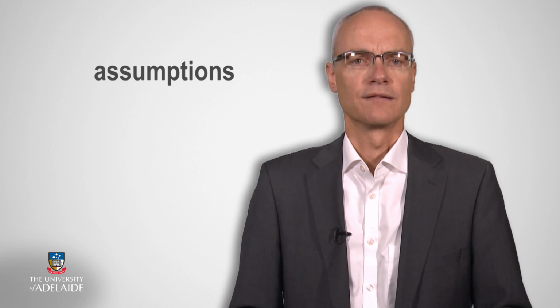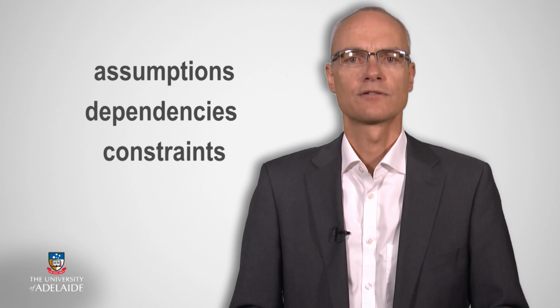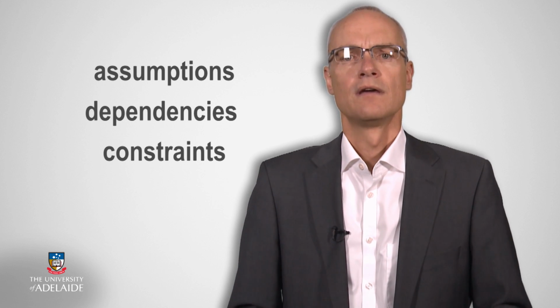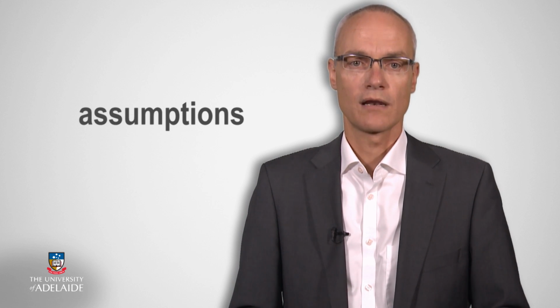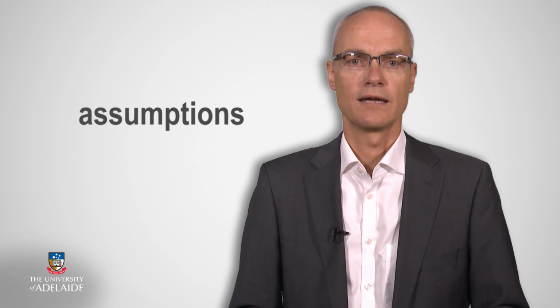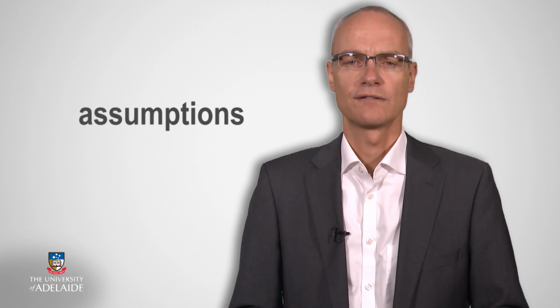It is best practice to set small objectives so that all stakeholders are clear on what the stated project objectives are. The next question that often gets asked is, what is the difference between assumptions, dependencies, and constraints of a project? In project management, assumptions are factors that are considered true, real, or certain that we'll need to consider in our forward planning with no proof of certainty, thus they may or may not eventuate. Assumptions affect every phase of the project management lifecycle.